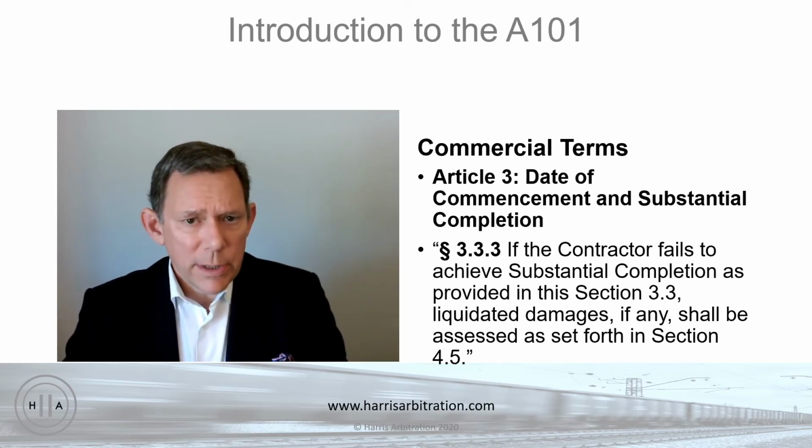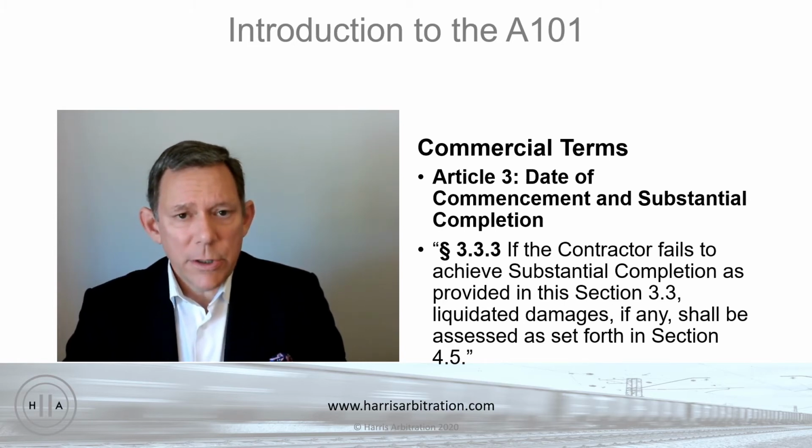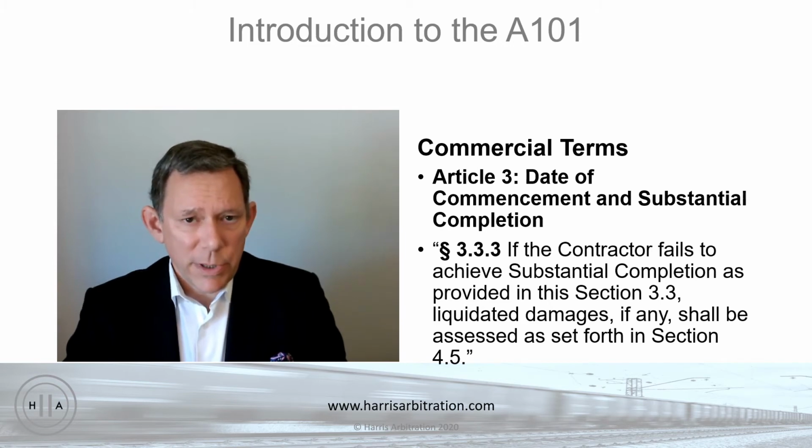But another point that's worth tying back to first-year contracts is the whole notion of substantial completion. You may recall that under the common law, the original rule was basically a contractor has to do 100% of the work before the owner is obligated to pay any money to the contractor under the contract.